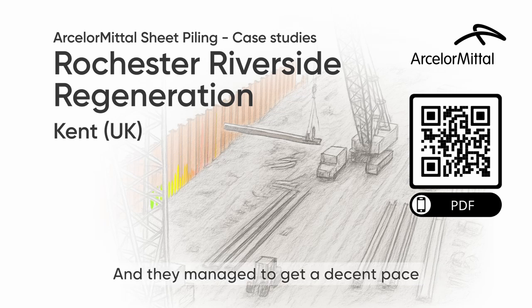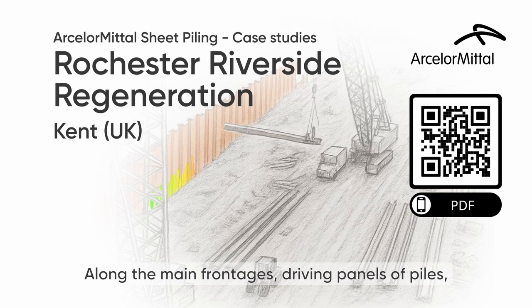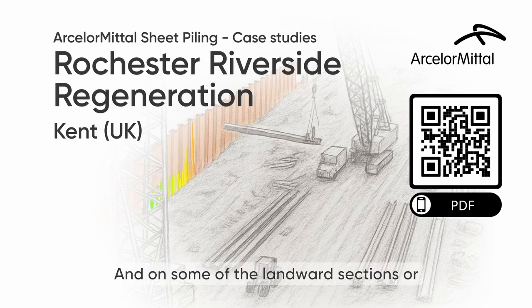And they managed to get a decent pace going. Oh yeah, pretty impressive rates. Along the main frontages, driving panels of piles, they were hitting around 40 linear meters of wall per week. 40 meters a week. And on some of the landward sections or creek walls, it was even faster, sometimes over 100 linear meters a week. That's really shifting some steel.